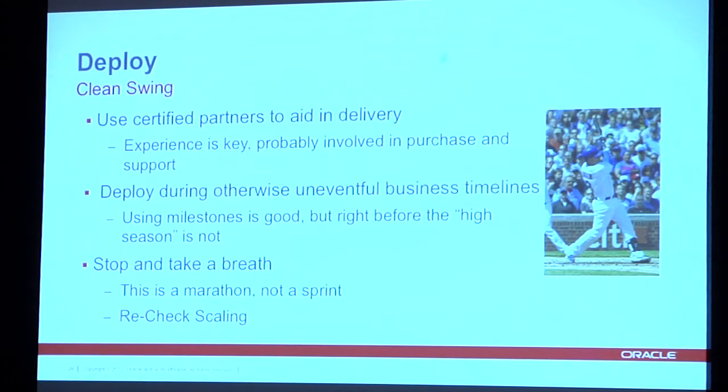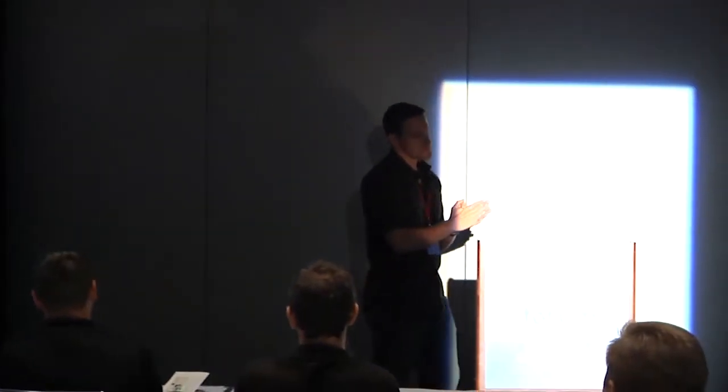So they did their VDI environment, they scaled it up, and it didn't work. They were trying to be ready for this big event rather than being ready before the big event and giving themselves enough time to bake it in. So give yourself ample time, prepare with significant advance warning, so that your ramp for your big season, or your big event, is all about increasing the size of something you already have, not deploying something new or greenfield.